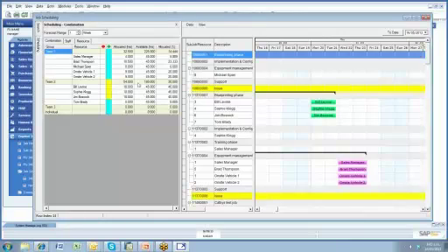So what I'm seeing here, on the left, I'm seeing my staff and my resources, and optionally you can put these into teams. Perhaps you're a transportation company moving big pieces of equipment all over the country, and you may have a team put together, which is a truck, the vehicle, plus the driver, plus perhaps two hands who are needed to go with that truck to unload and load. So you could put them all together as a team, or you could schedule people individually.